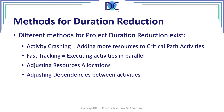We can also look at the different dependencies used between activities. Some dependencies are fixed, based on physical laws, and cannot be changed. Other dependencies may be more flexible, such as those based on best practices — the proven best way to do a job. However, changing best practices may introduce additional delays and risks.